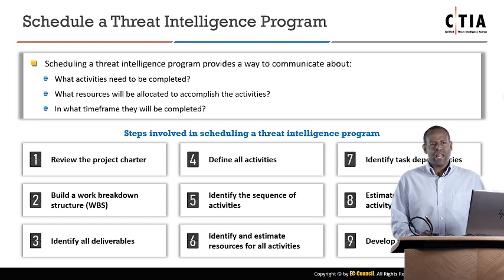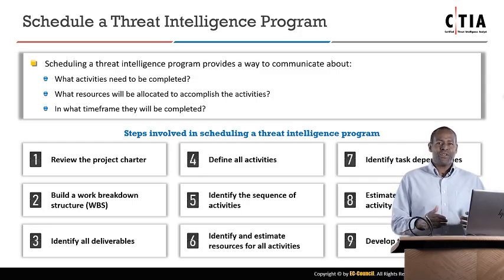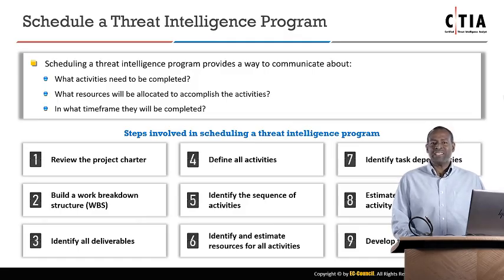And that sign, I think it was about 8 months later that I finally got that sign put up, and I was ribbed over and over again in that entire job whenever asked to do something. Is that going to take 2 weeks, Kevin? So we always want to make sure that we consult with experienced project managers to be able to identify the time duration for each task and each activity, and don't just throw 2 weeks out there. It doesn't work, believe me.